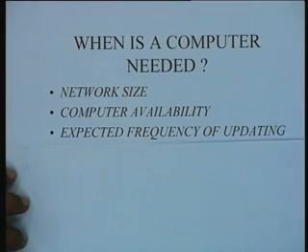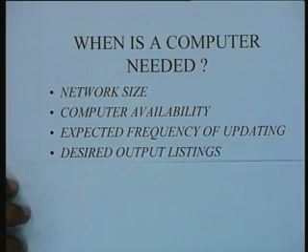So obviously, if you want to do it only once a year, then of course it is a separate thing, but if you have to do it weekly or monthly even, then this frequency of updating actually favors the use of a computer. The higher the frequency of updating, the greater the advantage that you have for using a computer.